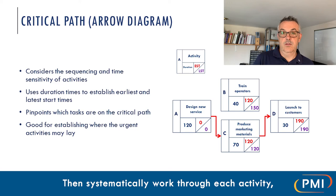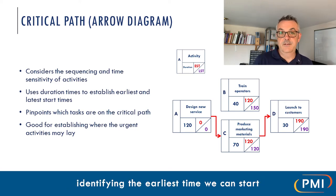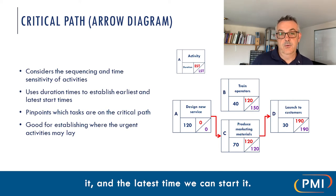Then systematically work through each activity, identifying the earliest time you can start it and the latest time you can start it.